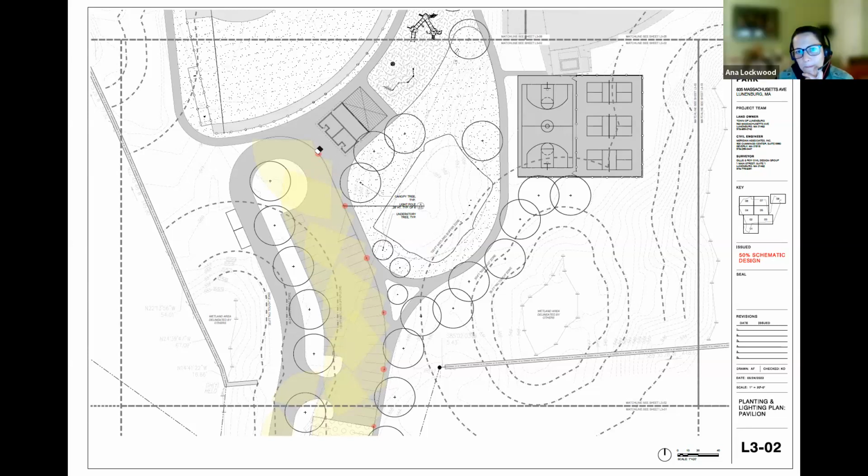We try to judiciously use lights as needed for safety. In terms of the actual infrastructure, we would need to have lines brought in from the street, but once they're in there, providing line voltage, I can't speak precisely to cost, but it is something to consider. I know that our cost estimator did carry some line item for lighting. So it can bring up the cost, yes.